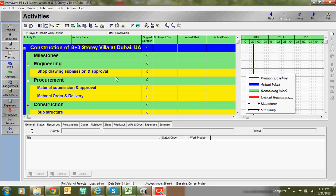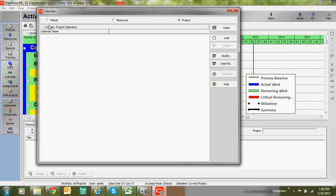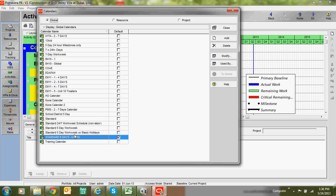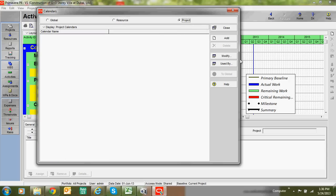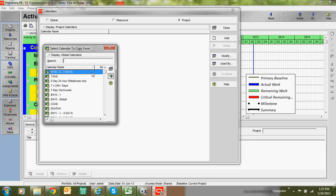Before adding activities, you should add a calendar. Go to Enterprises and add a calendar. Here we have three types: Global, Resources, and Projects. In Global, there are many predefined calendars. Resource calendars are for resources only, such as labor or machinery. Project calendars are where you can create your own calendar by importing from the global calendar.